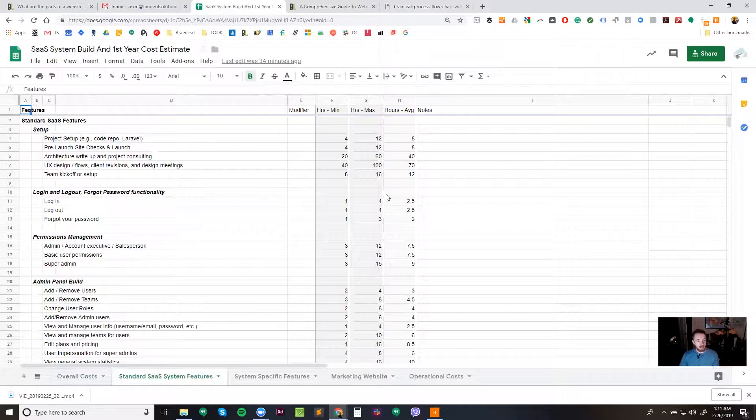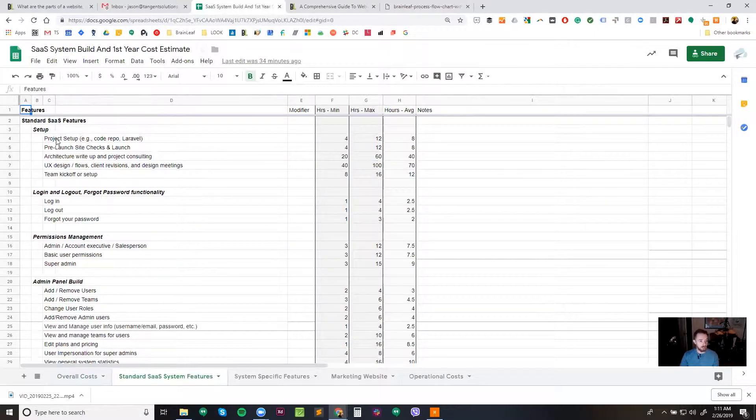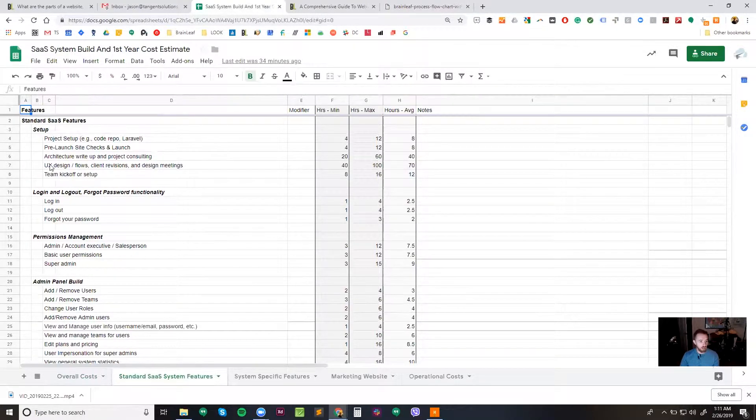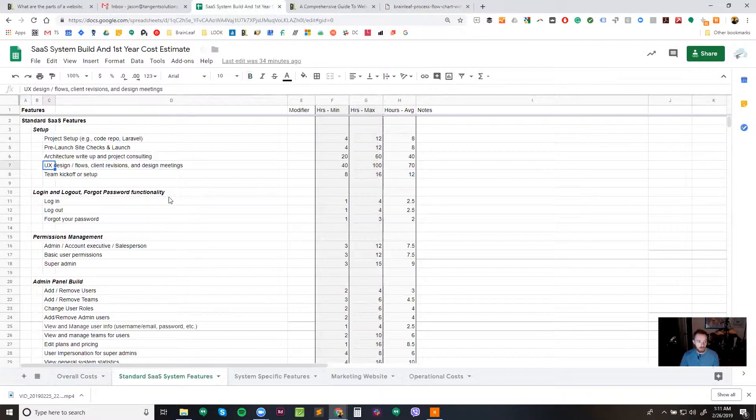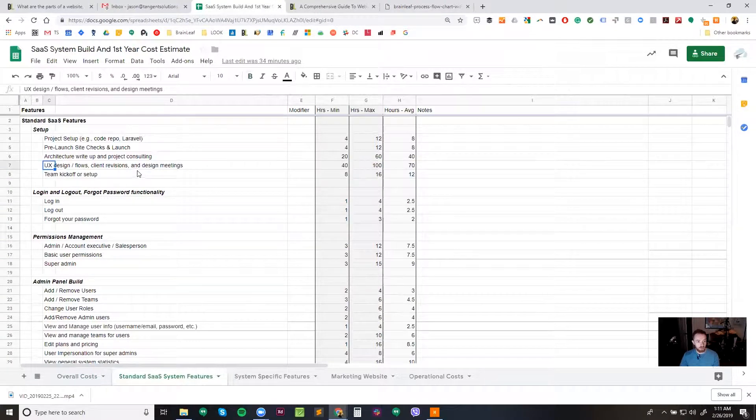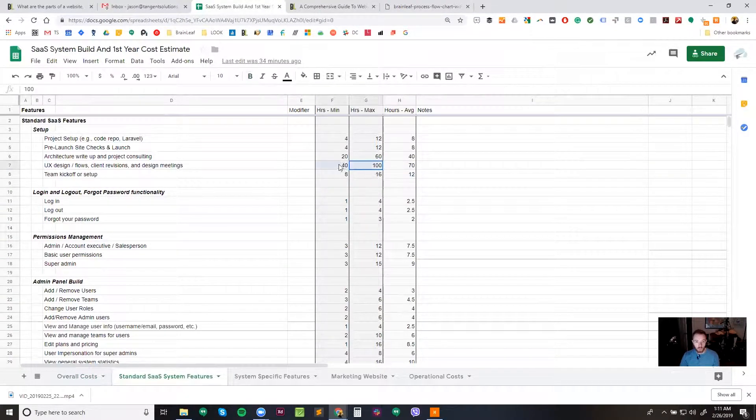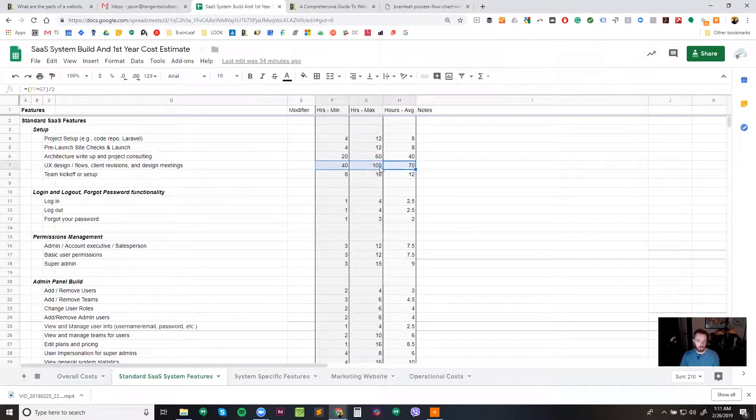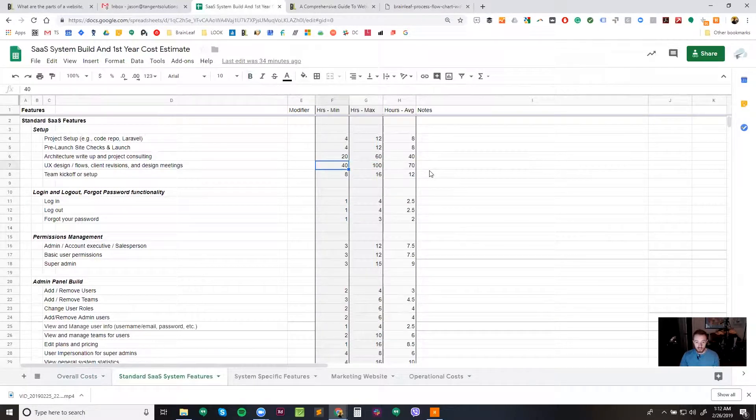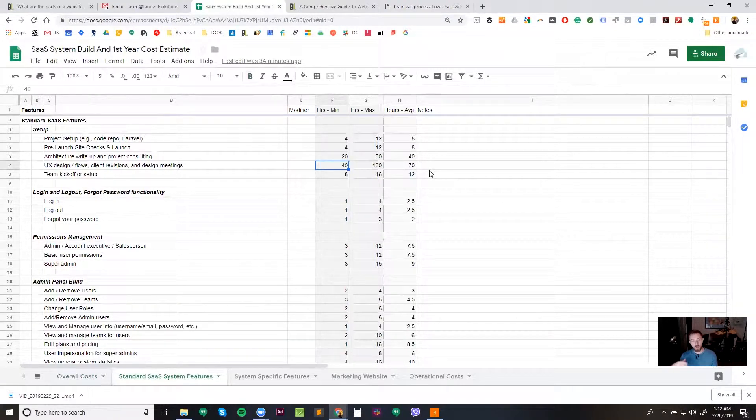In this area, we start off with just looking at the general stuff that every single SaaS system needs. That's going to include things like project setup, pre-launch site checks and launch, architecture write-up, UX, design flows, revisions, design meetings, team kickoff, etc. And I would like to point out that within the UX, design flows, client revisions, etc., this can very often get way higher than 40 to 100 hours. This can be 500 hours, 600, 700, and up sometimes. It really just depends on what the project is, what goes into it, how big it is.